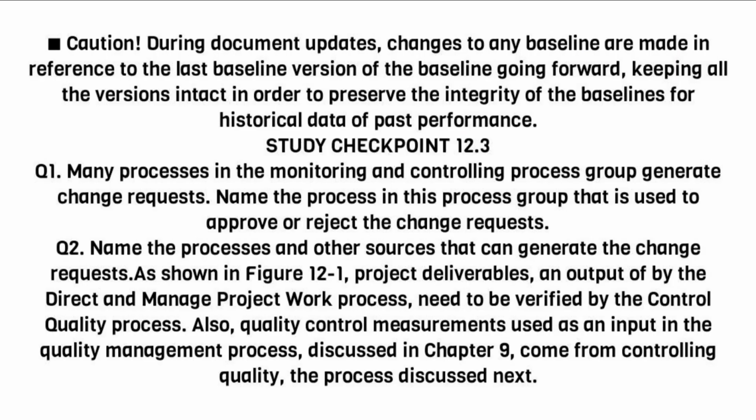Caution! During document updates, changes to any baseline are made in reference to the last baseline version of the baseline going forward, keeping all the versions intact in order to preserve the integrity of the baselines for historical data of past performance. Study Checkpoint 12.3.